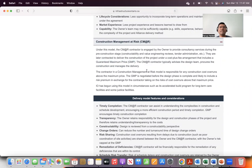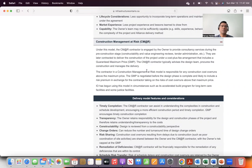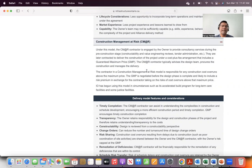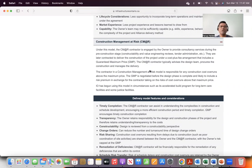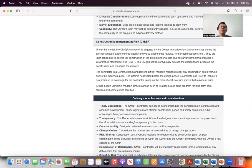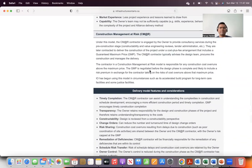The reason this contractor can take on this risk is because of two things. Number one, they were involved pre-construction. Before the construction actually happens, this contractor is involved. They go through all the drawings, understand the plan, and provide input. Hopefully those inputs are incorporated in the plan, which reduces change orders and any risk associated with that. There's a balance of the risk, and that's why it's known as construction management at risk.